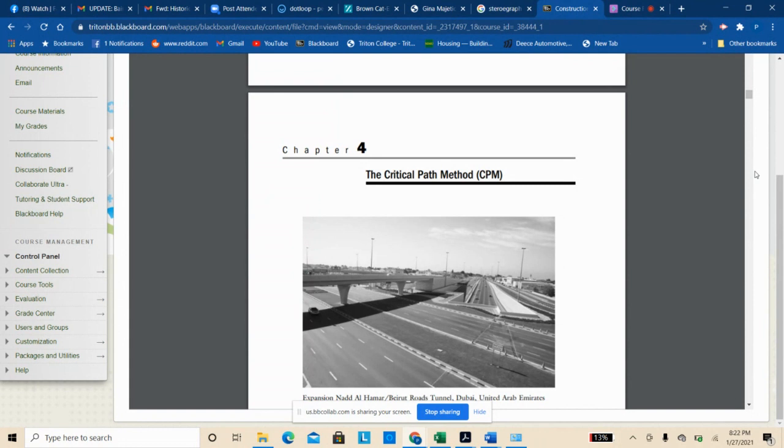Ordering and receiving the new items to install. Correct, yeah. That's a big thing that we'll get into as we talk through some of these things: your lead time on a lot of products. For kitchen cabinets, it can easily be 8 to 10 weeks from when they take your down payment.